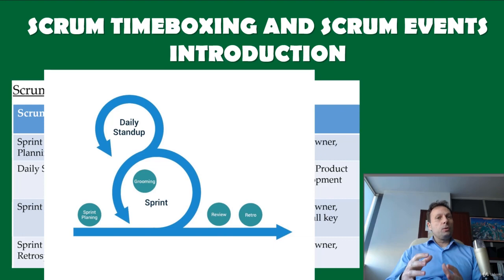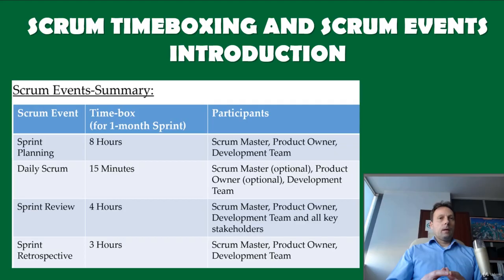Timeboxing is used to define the length of the sprint. The sprint is timeboxed to 1 month or less, in which the Scrum team will deliver the sprint goals. Sprint planning. When a team launches, they establish the time box for the sprint planning meeting. As noted in the Scrum Guide, a sprint planning meeting should be timeboxed at 8 hours or less for a 1-month sprint. The shorter the sprint, the shorter the time box should be for the sprint planning.